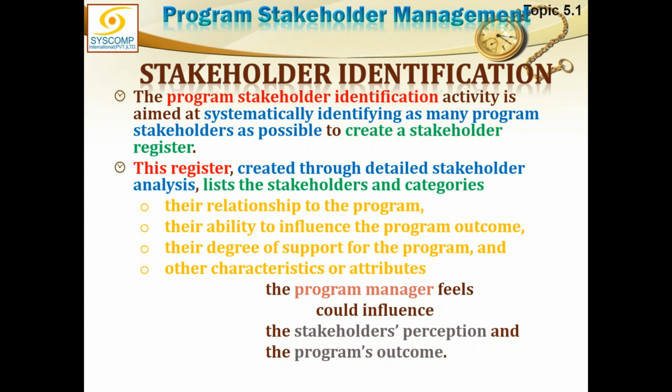When you are identifying them, just keep counting. Don't reject any stakeholder because it is too small, too dark, too red or too green. This red, green, all of that we can discuss and analyze later, but bring them all onto the register.